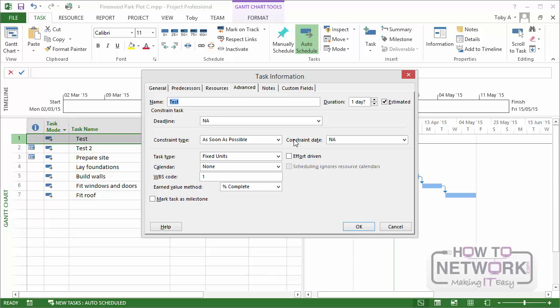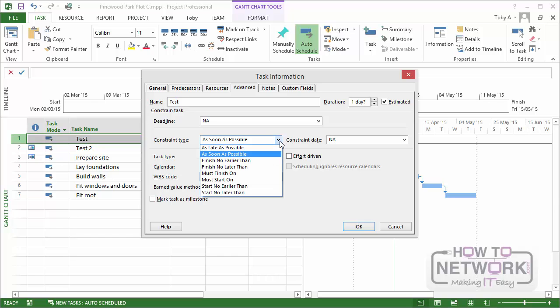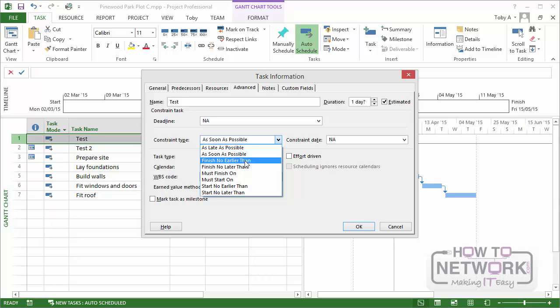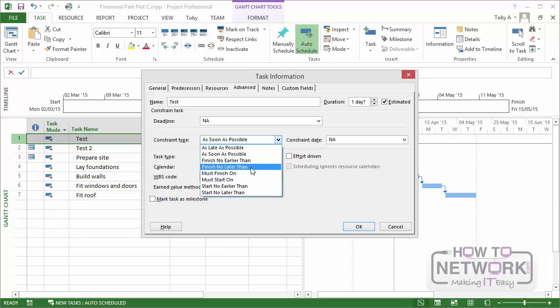If you schedule a project from the end date, then by default the constraint type will be as late as possible. Now there are many constraint types. So we have as late as possible, as soon as possible. Finish no earlier than. If we specify finish no earlier than it means this task mustn't finish before a date. And the date is specified in the constraint date.